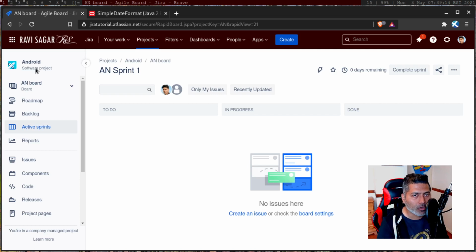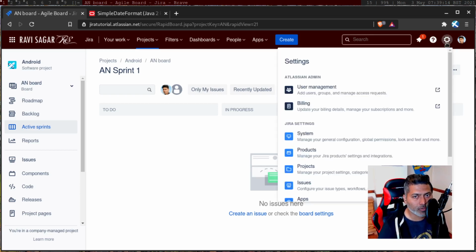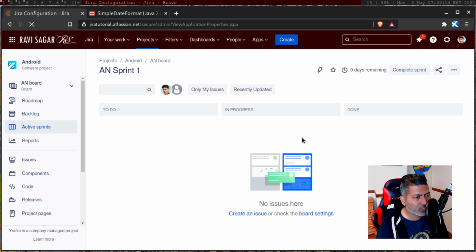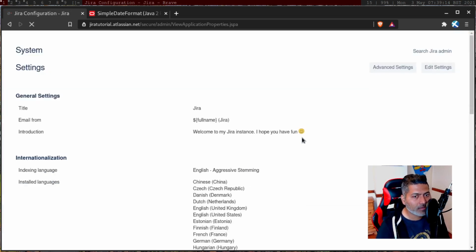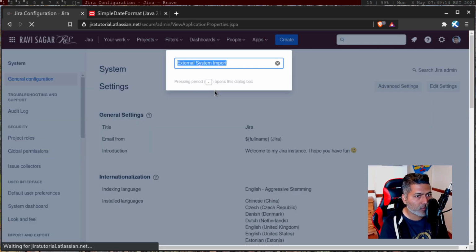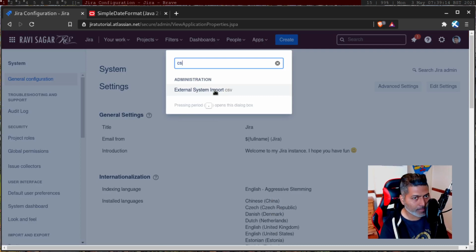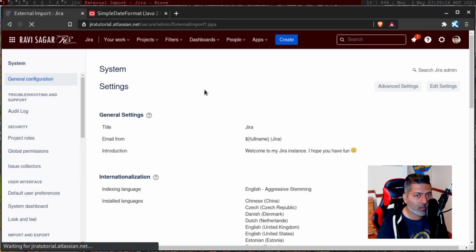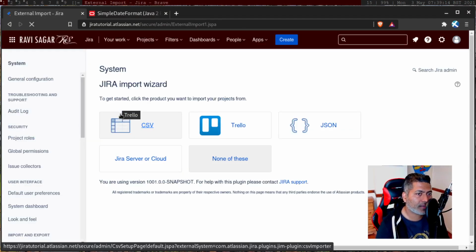You have to map these columns, and if you're able to perform the import successfully, then you should be able to download one configuration file, which I really find handy, because I don't really want to perform the mapping over and over again. In most of the cases, the mappings are usually the same, apart from a couple of columns. But if you're importing the same file, I'll share the configuration file of those mappings, and then you can quickly